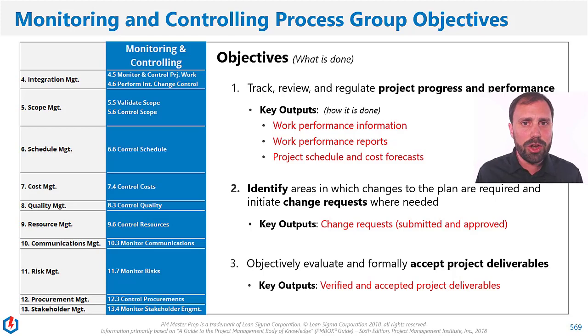Because on the exam, you're going to get questions that say, you're here, the customer doesn't accept a deliverable. Oh no, we already said it was an accepted deliverable. How does a verified deliverable get to accepted deliverable? The only way it goes from verified deliverable to accepted deliverable is if the customer says thumbs up. So what happens when that doesn't happen? You're going to have questions like that. Change requests, adjustments, those kind of things. So you got to see this thing as a system. You know where the change requests go, where they flow back, and you know how that stuff goes.